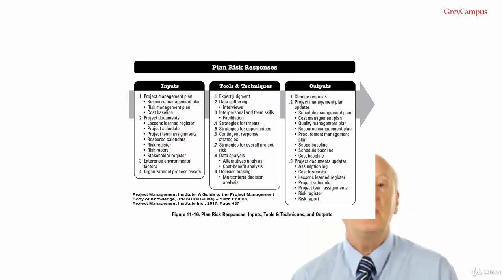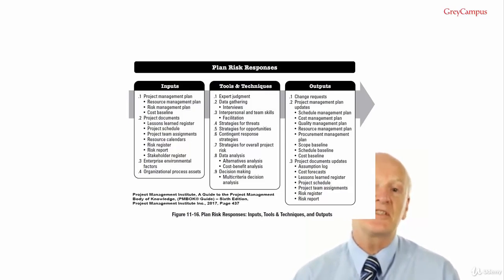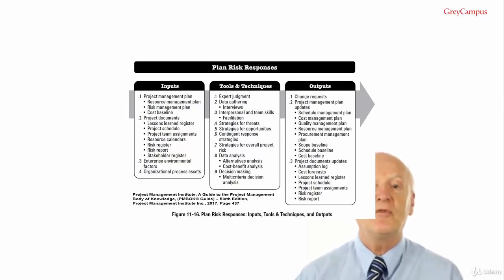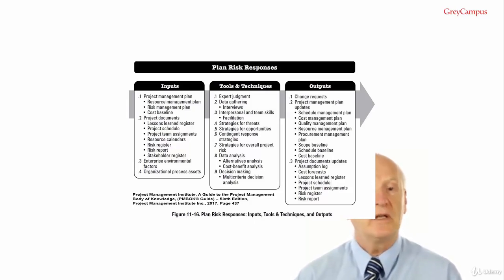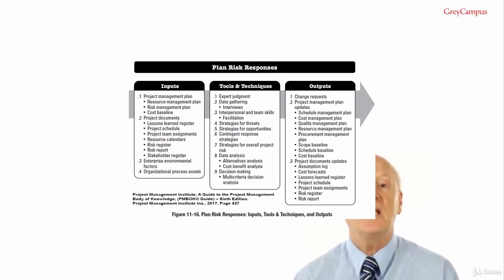Building the plant at another location in the US within the 300-mile limit has a greater than 0% chance of an earthquake risk. The risk owner may also take action to isolate the project's objectives from the risk's impact if it were to occur. Examples of avoidance actions may include removing the cause of a threat, extending the schedule, changing the project strategy, or reducing scope. Some risks may be avoided by clarifying requirements, obtaining information, improved communication, or acquiring expertise. But whatever, the bottom line is it must be 0% possibility of the risk occurring.